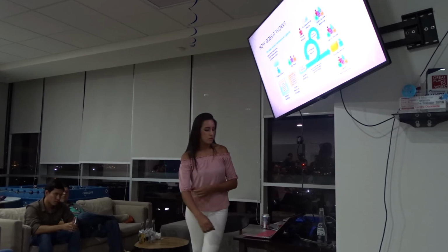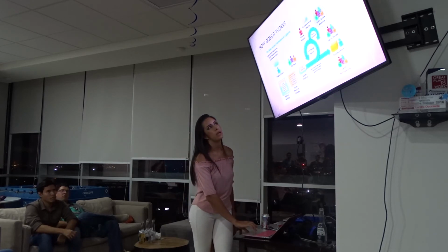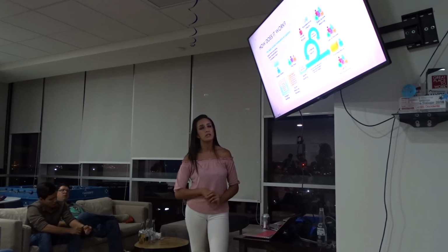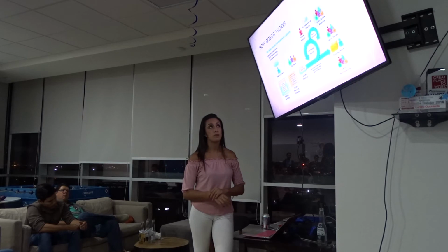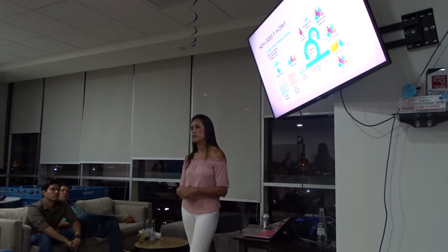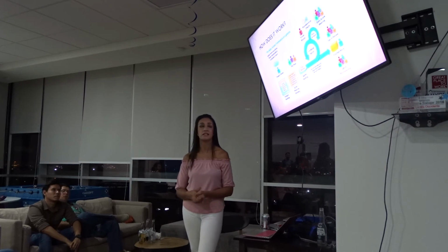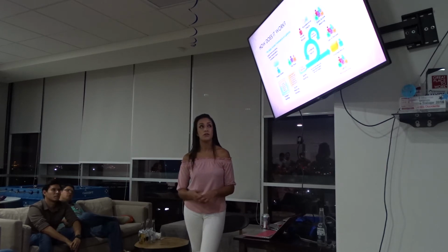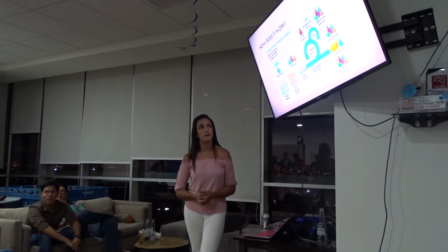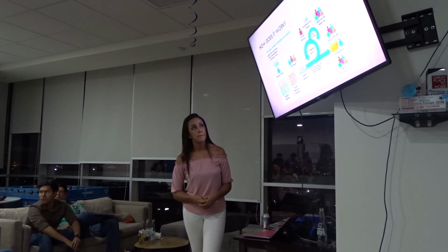And the Scrum Master also, weekly or monthly, presents some burn down charts. That's how much work has been completed and how much work is remaining. So the team can see if they're doing good, if they should hurry, or if they're just sitting there and not working. So the team knows how much work still remains and continues working on it.